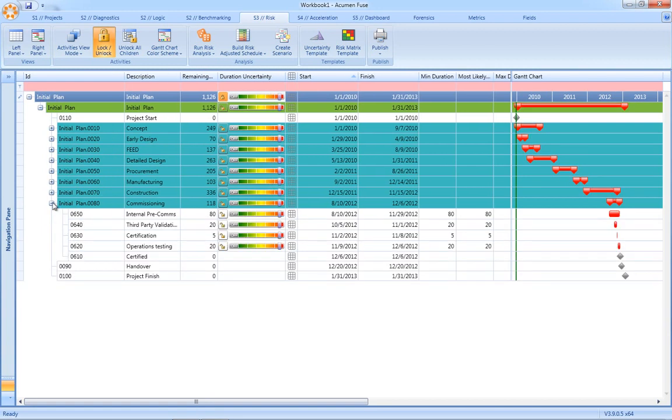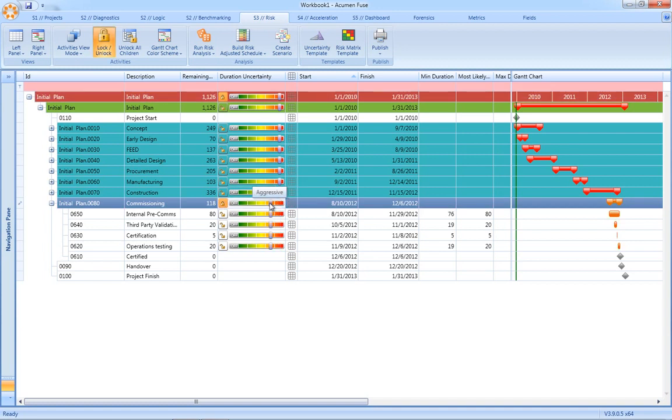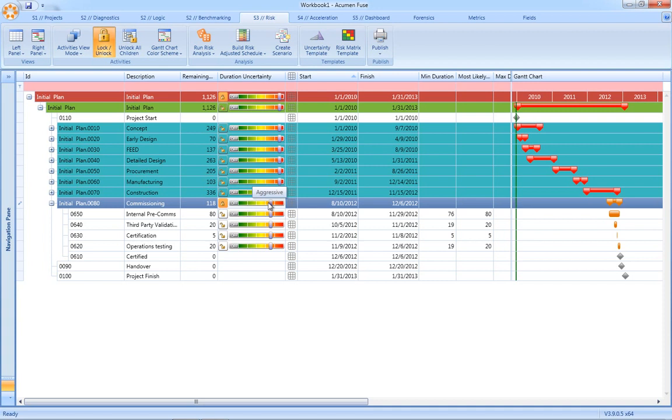If we just expand the schedule, you'll notice that as we apply the uncertainty factor at the parent level, the children activities inherit the same uncertainty factor. So the net result is we can risk load a schedule very quickly using this top-down approach.